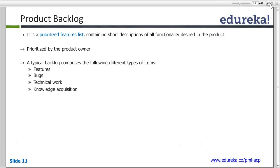But at the later stage when these requirements are to be worked on, they are detailed out in discussion with the team. The product owner just enters probably one or two lines to describe a story, but the detailed description and acceptance criteria would always be done in association with the team. He just owns it, but it's maintained and detailed out by the complete team.